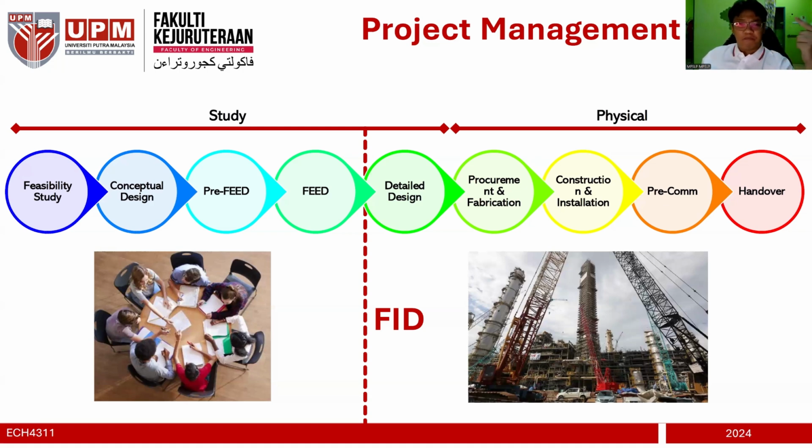Among the key deliverables are your calculations from your process simulation, as per HYSYS, Pro/II, DWC, whatever you have, or maybe for a big company, they probably have their own internal software to do calculation. You have P&IDs, an equipment list, a line list, and stuff like that. Basically you have a FEED package that is used for contract bidding.